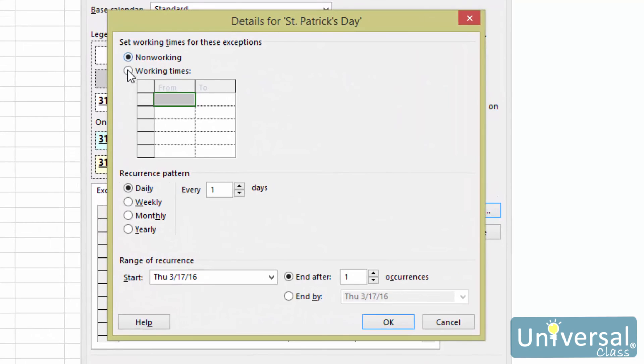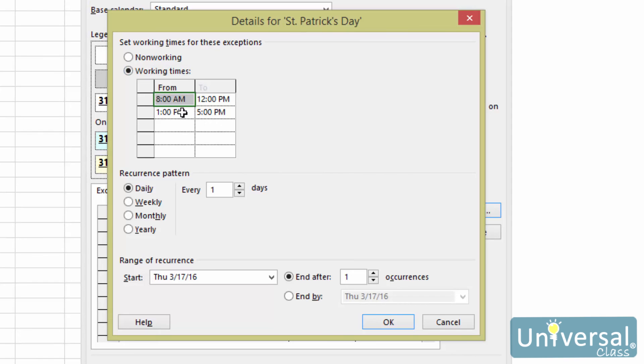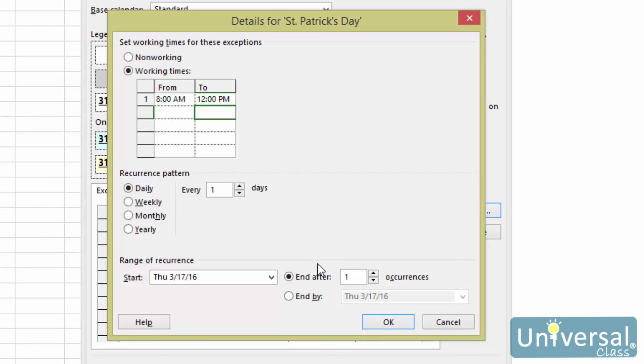Notice that we can check working times here. Then enter the working times for that day. Since we only want to work the half day, we're going to put in just the first section of the day, which is four hours. Now, since this is a one-time instance only, we have it set to end after one occurrence. Click OK when you're finished.